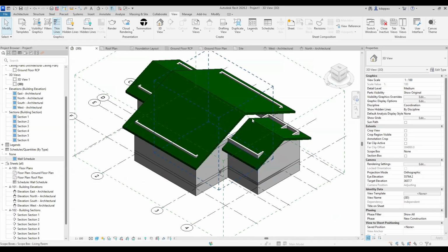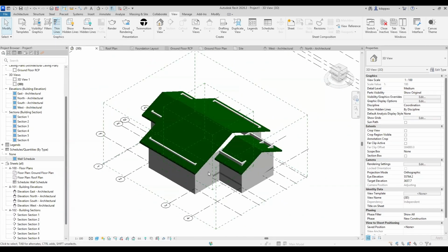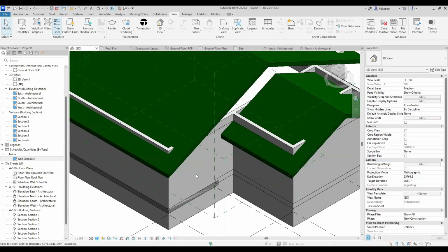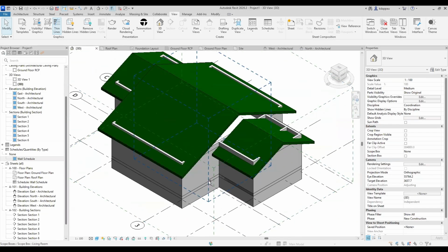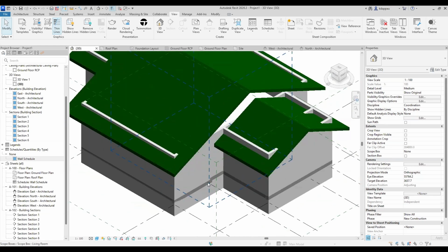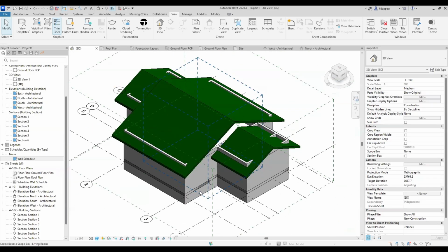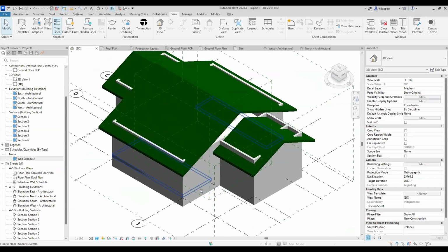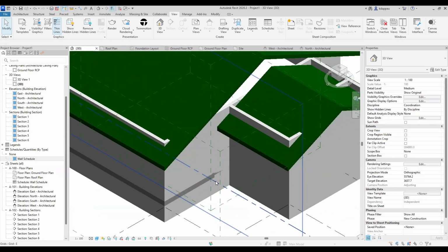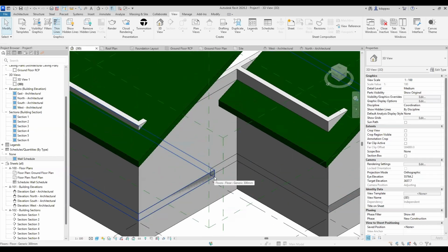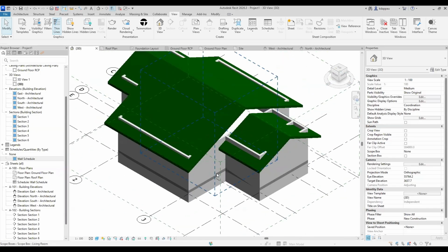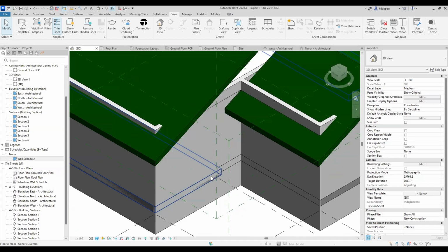So I went and then modeled it. When I finished the model, we needed about 5,800 and something square meters. 5,800, less than 6,000 square meters. Do you understand? Do you know the value the Chinese submitted? It was about 18,000 square meters, more than triple. More than triple the volume. Meanwhile, this marble was very, very, very what?